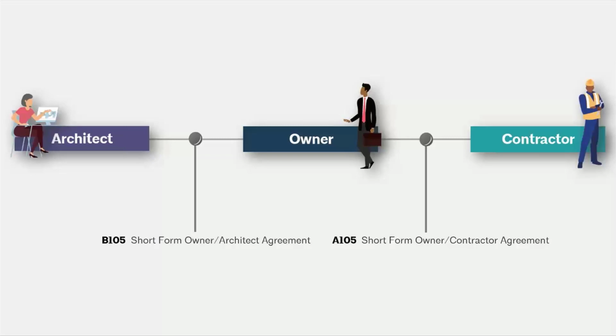Ben, do you have anything to add on the short form small project documents? Yes, so to talk about the short form or small versus the medium or the large, there are some important differences there too, of course. One difference is that with the small, we omitted any sort of dispute resolution language. So there's nothing about resolving any potential disputes, whereas the medium and of course the large have a mechanism by which the parties agree ahead of time to resolve disputes.